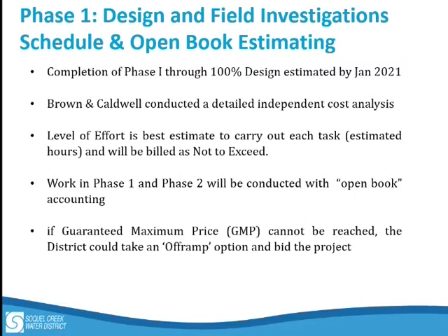And then come October, they're going to present us with a guaranteed price that they will build the pipeline for, and then we'll consider that and bring it to you as a board to approve if you wish, and that will be a phase two amendment that will be processed separately. So that'll take a separate approval. Right now, you're just approving design work.